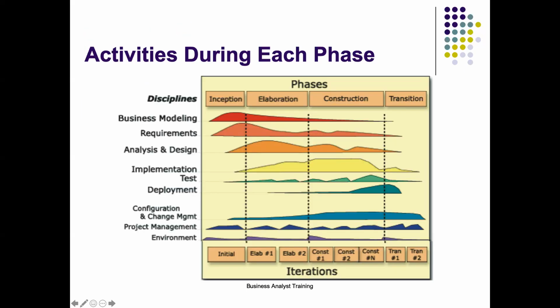Right? So it gives an understanding of how your work would be divided between phases. Similarly, test, right? Your main peak is after the construction has happened. But it's not like you will just get started when the construction is done. You as a testing team will continue to work on writing test cases based upon whatever phase the requirements are ready, and then you will peak a little bit when you get more chance. But the actual testing happens when the construction is almost done, right?